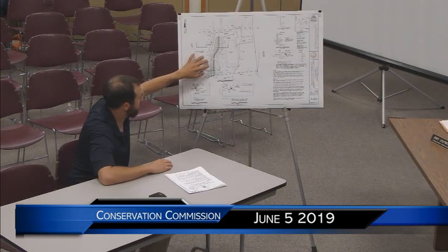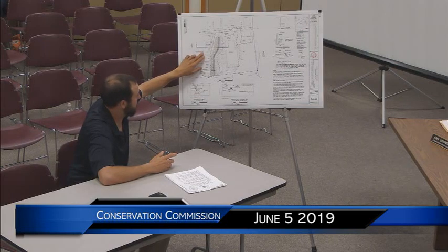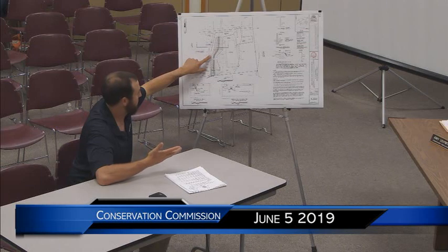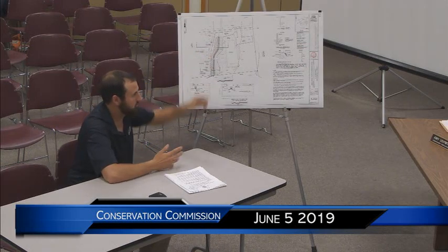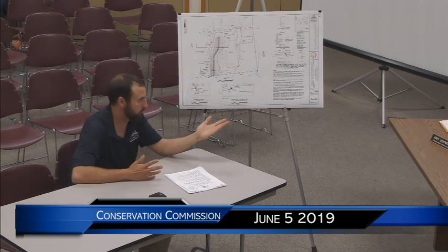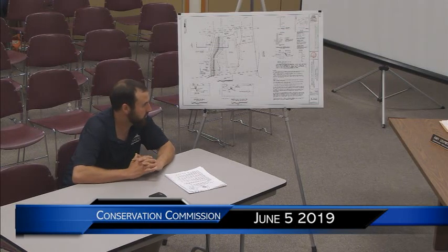Now, I believe this is going to be the final footprint. The difference as far as the revetment itself goes is going to be the beginning of the taper of the revetment. And it's really just going to be a matter of moving this arrow to here. Right. And as far as a plantings plan goes, a plantings report could be submitted, auxiliary to this, with the overall area and a description of what would be planted based on your suggestions. Suffice? Usually we would see at least a table on the plan that said, okay, call the area north of the dock area A and south of the dock area B, and you'd say how many, what type, et cetera, are going to be planted in each area. Okay.